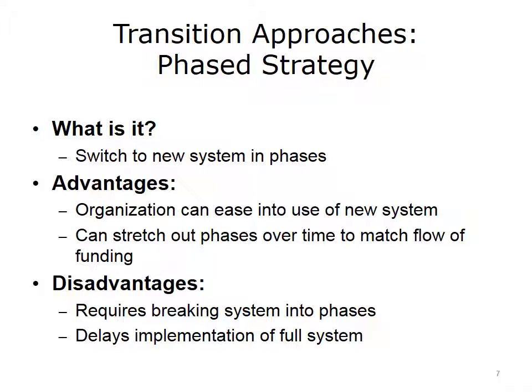Such a plan requires careful consideration about the best ways to break apart the system into portions. It may be by logical function or by workflow or by organizational unit or some combination. Because each phase requires fitting in with the current system as it is evolving, there can be considerable integration effort required when you have these kinds of phase strategies.